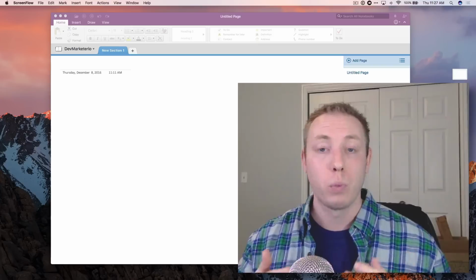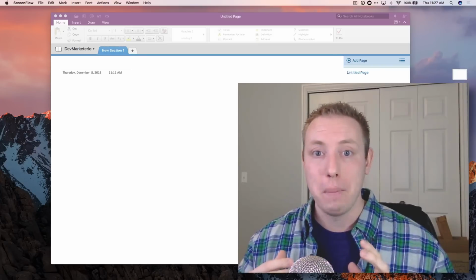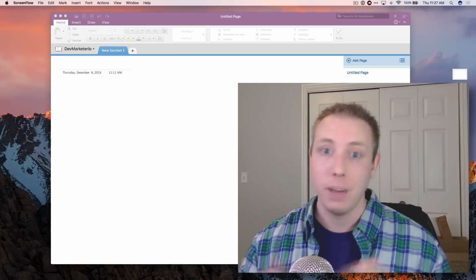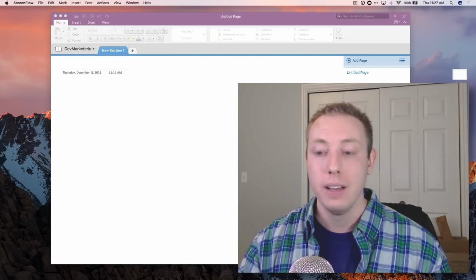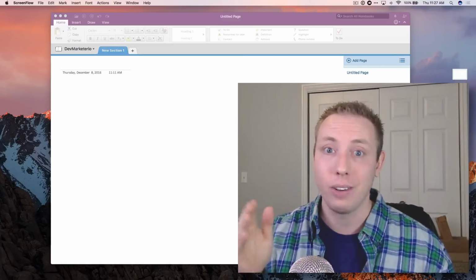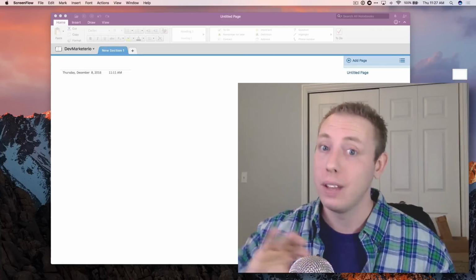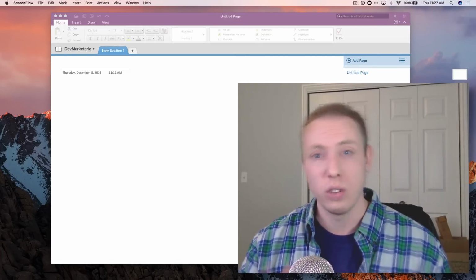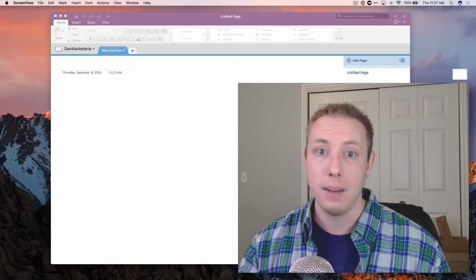So it's really not worth it. I'll work for a little bit. If they're a little bit late, I'll keep working in good faith, depending on the relationship I have with the client. But you can't just keep working forever, because I promise you, if someone's not paying some of these early installments, then they're not going to pay you for the later ones, and you're just wasting your time. So it's just not worth it. And so it's important to have those time frames set into place.